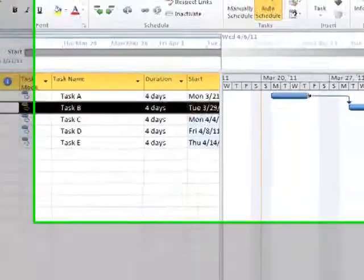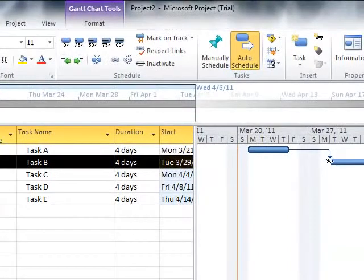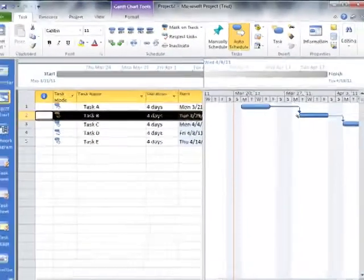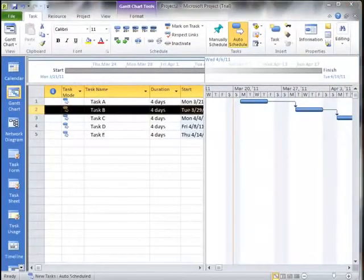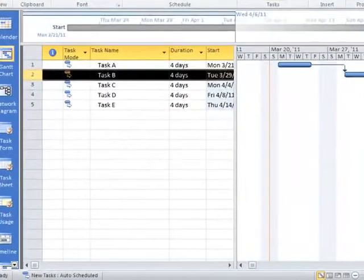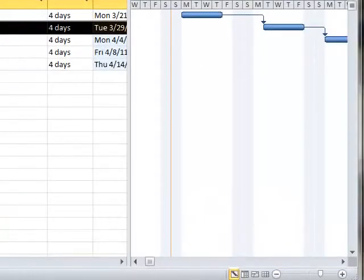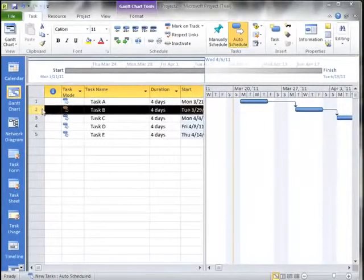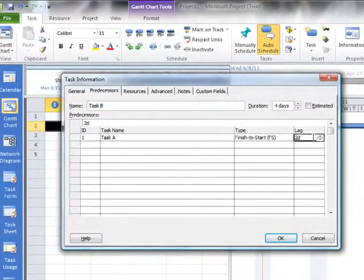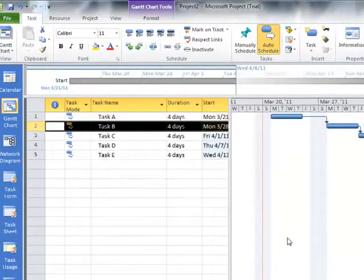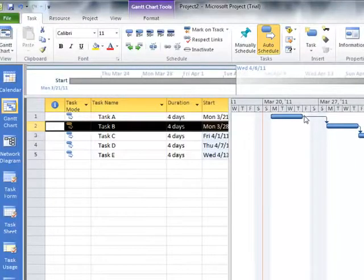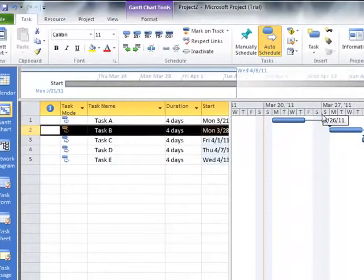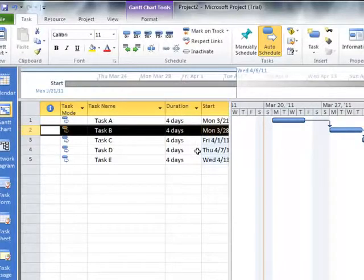Our next task is not going to start until the beginning of Tuesday morning. But we know that the paint drying, that's not an activity that just happens during work days. That could also happen over the weekend. So we could change our relationship here and say that that is going to be two E days or elapsed days. Notice how that changes our calendar. We end on a Thursday. We have two days Friday and Saturday. This next task, Task B, the actual work can't start on Sunday morning, so it starts on Monday morning. It's a better way to enter that type of lag.